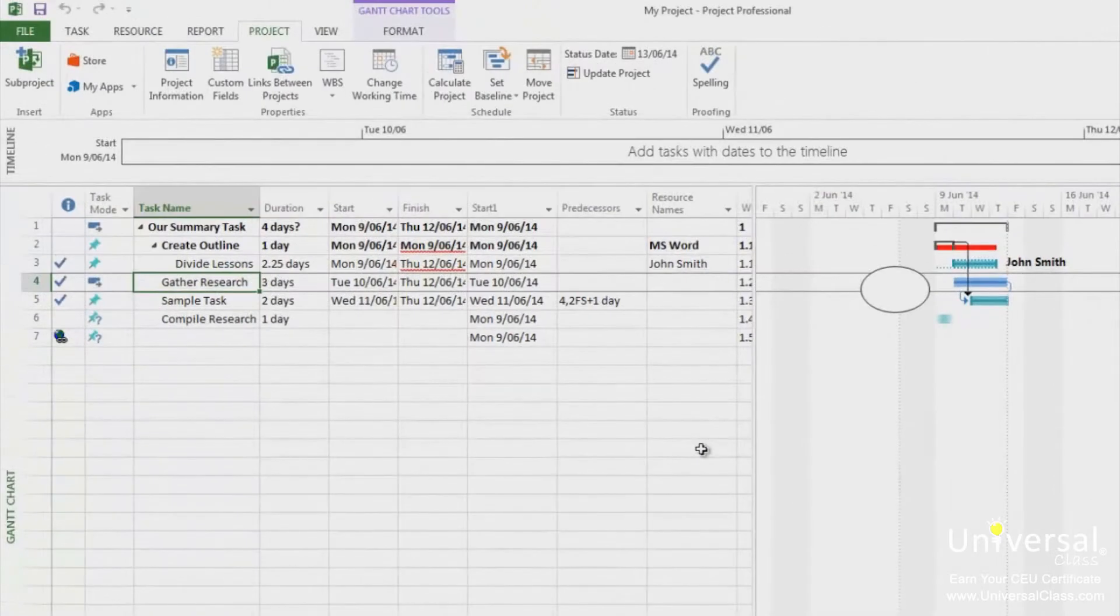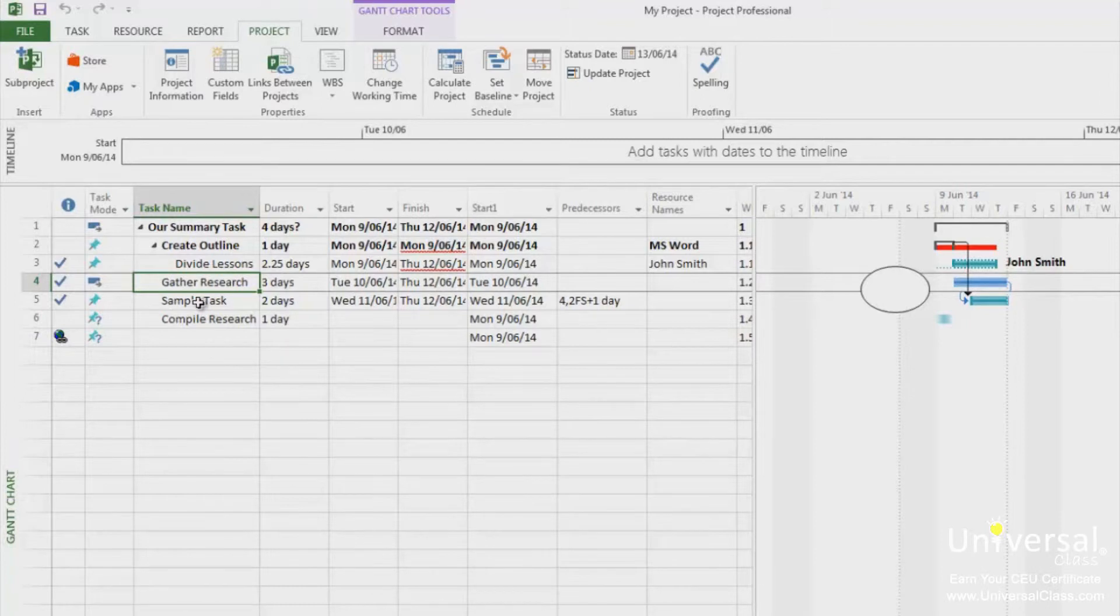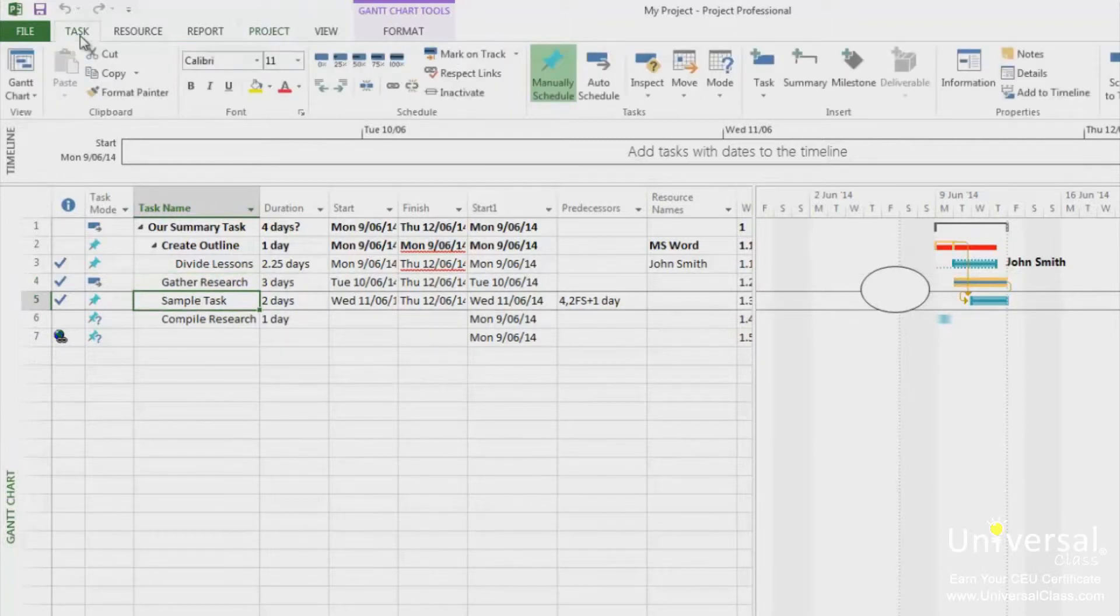When you're trying to enter a project status and you notice that a task will be on schedule as of that status date, you can mark the task as part of the way complete as of the status date. To do this, select the task you want to update, then go to the Task tab and then click on Mark on Track.